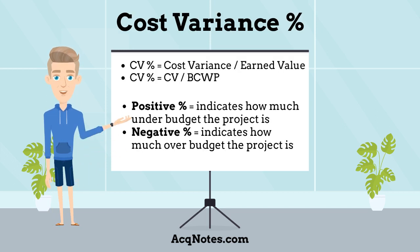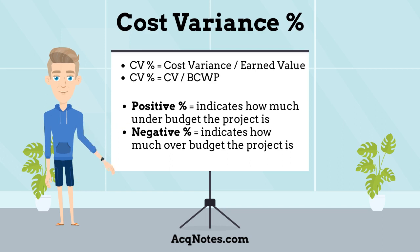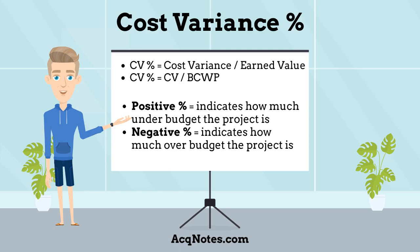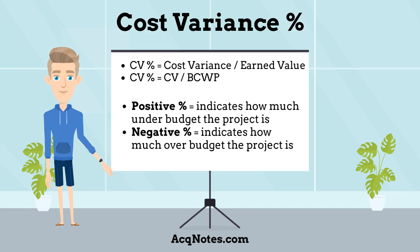The second cost variance type is Cost Variance Percentage. It can be calculated using the following formulas: Cost Variance Percentage equals Cost Variance divided by Earned Value, or Cost Variance divided by Budgeted Cost of Work Performed. Cost Variance Percent indicates how much over or under budget the project is. A positive percentage indicates how much under budget the project is.